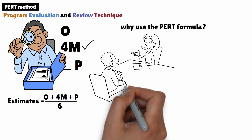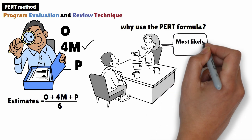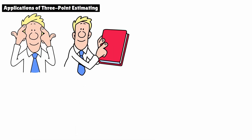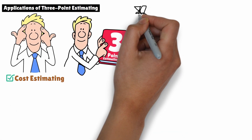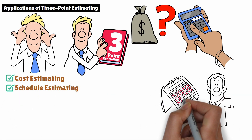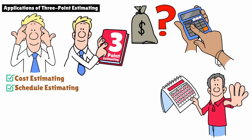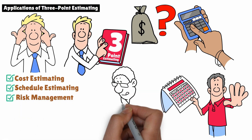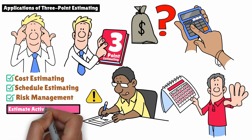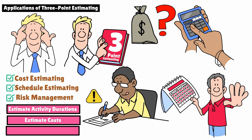So why use the PERT formula? The PERT method is especially helpful when there's more confidence in the most likely scenario, but you still want to account for risk and uncertainty on either end. You can apply three-point estimating in various aspects of project management, such as cost estimating — when you need to estimate how much a project will cost while accounting for potential fluctuations in price or scope; schedule estimating — for estimating activity durations where there could be delays or faster-than-expected progress; and risk management — since this technique inherently considers uncertainty, it's great for managing risks. You'll typically use three-point estimating during processes like estimate activity durations, estimate costs, and estimate activity resources.